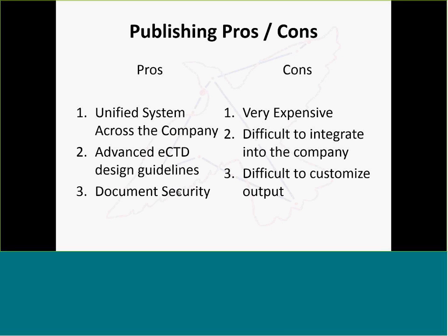And talking about ongoing costs of about $45,000 to $50,000 a year plus your staff of two, one being a manager level, so you're probably talking $150,000 in salary between the two people, plus another $45,000 to $50,000 in expense. So you're looking at $200,000 a year of expenses dedicated to publishing.